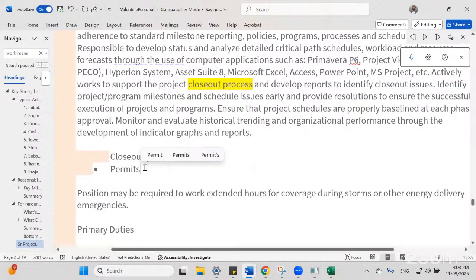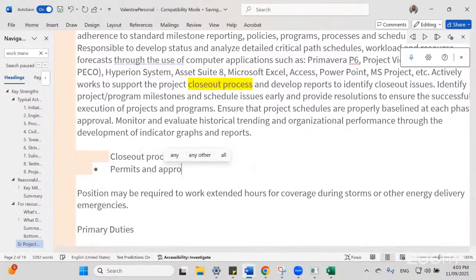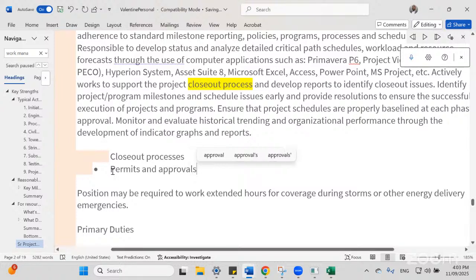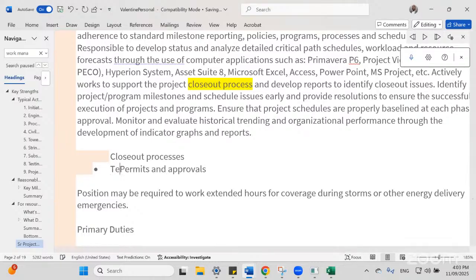Yes, permits and approvals are required. After installing all the MEP items like water line, fire line, drainage system, we have to take approval from local authorities, as per specification, standards, and bylaws.